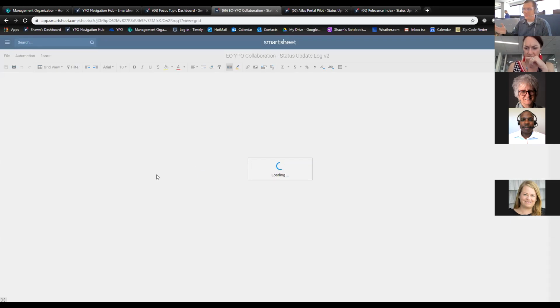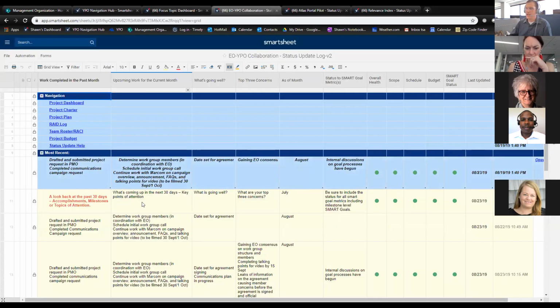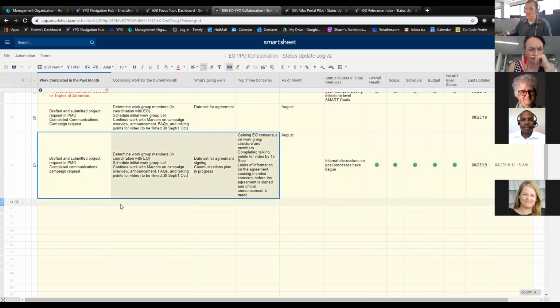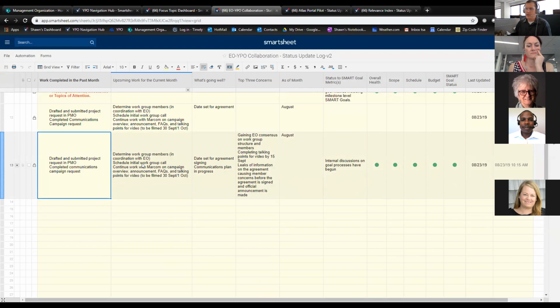But if that does happen, you can take your status update and paste it into the very next line. So like if I just copied that, brought it down into the next line, edit it, and then hit save, this is the line that'll get reported. It's always the most recent line that gets reported. So you don't have to worry about going back to fix the previous line. But yeah, it does get locked. And that was requested by senior leadership.